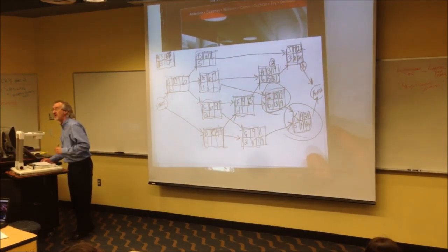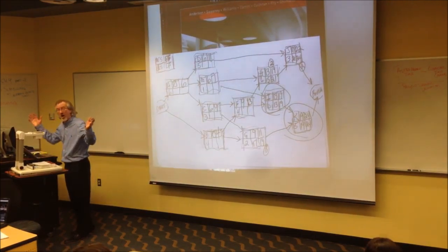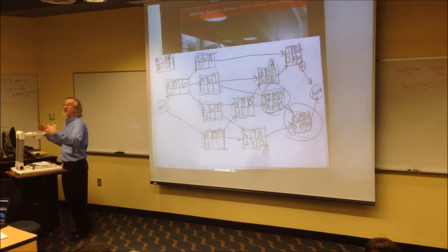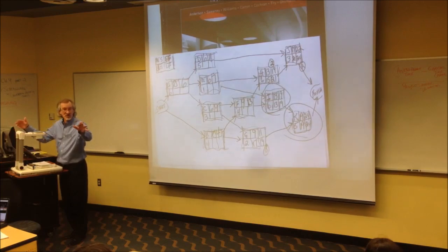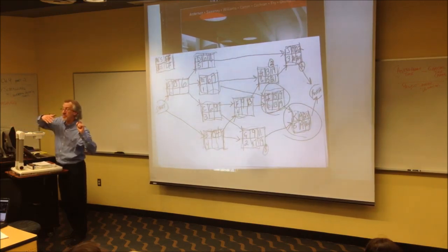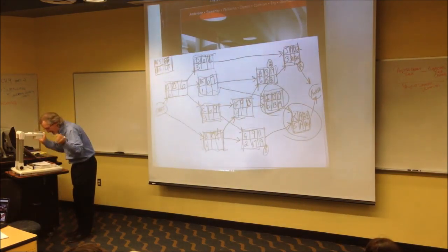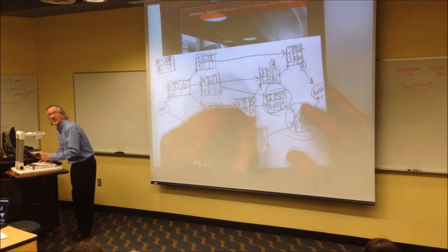No, so it has slack of 8. F, now here we go. 2 activities after. It proceeds 2 different activities. Our choices are between what 2 numbers? 15 and 13, and when we're going backwards, we pick which one of the 2? Smallest, there you go. Minus 4 is 9, slack or critical?